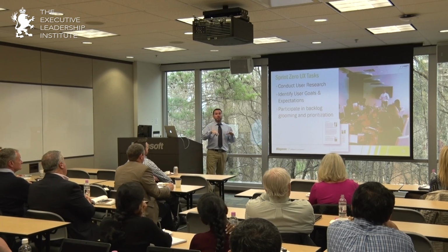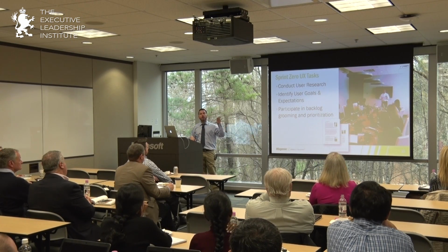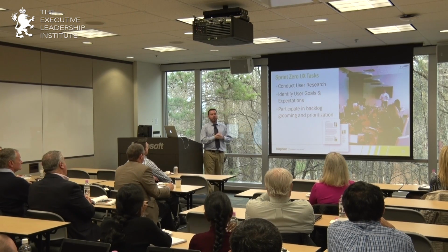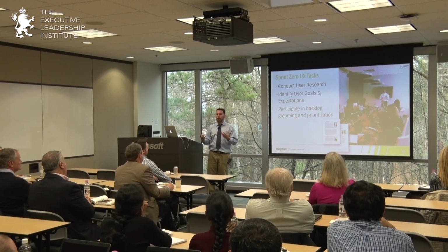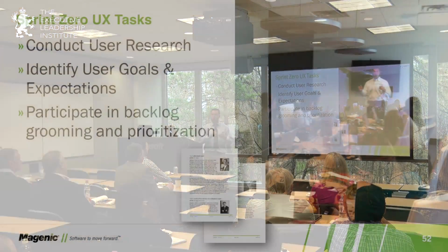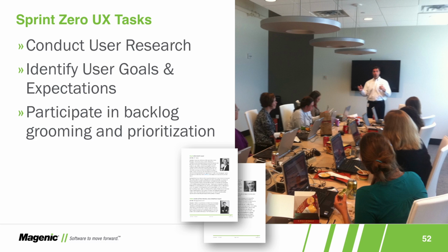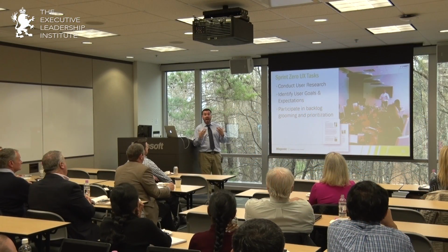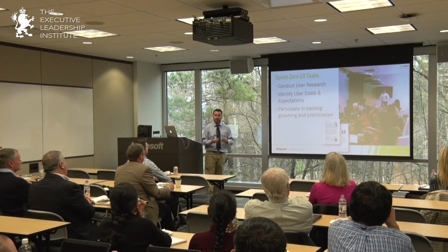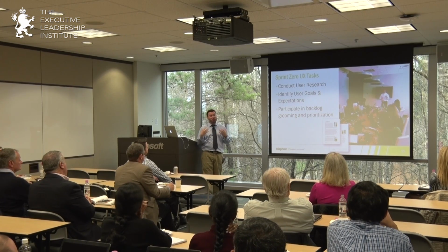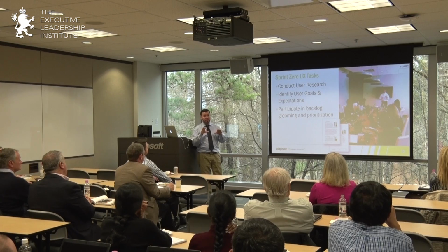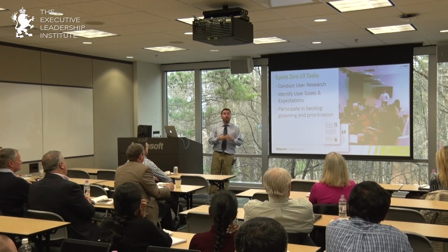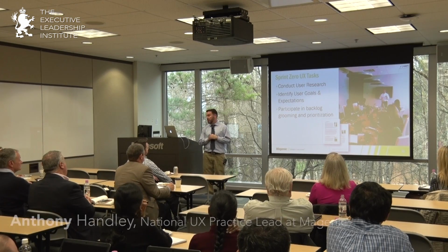So if we look at a couple of different things, we look at it like a sprint zero or an initiation, typically described in an Agile or an iterative fashion. This is really some foundational stuff. True Agile, you just start coding on day one. You just start designing on day one. Well, sometimes that works in certain situations, but from my experience, having a little bit of foundation helps. You don't have to take 6 months and build a business requirements document, but you do need to work within a sprint zero and help to identify what those backlog items are, or at least initially, those high-level user stories, or epics as they call them.